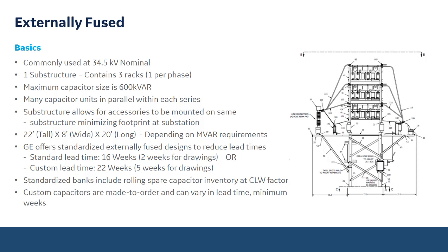By using this, if there's no spares out on site, in order to get that bank up and energized again, you can place an order with Clearwater, and we can supply those spare units much quicker than a custom unit that will have a much longer lead time. Some systems won't allow for that standardized part, but if it's tolerable, it's definitely recommended. We've had pretty good success with this.